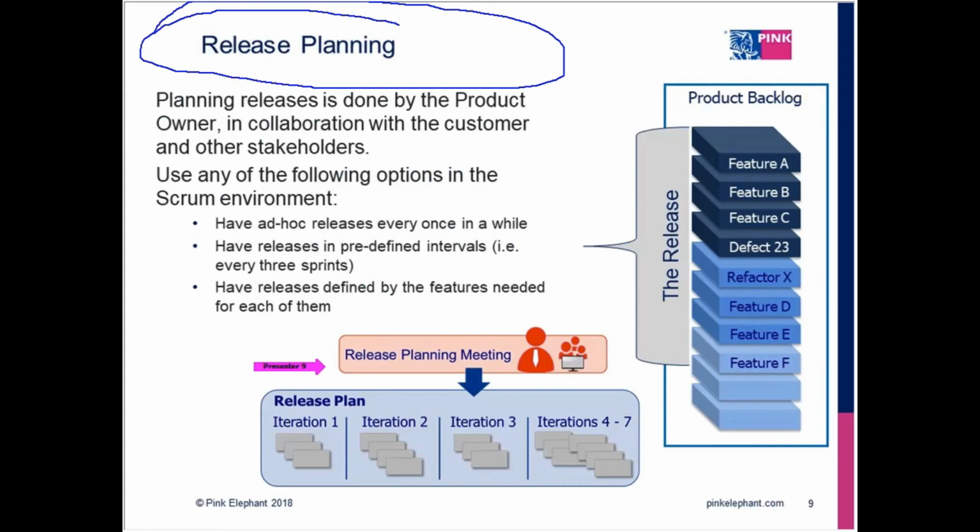The next part of the release planning is saying, during the project and the release itself, each iteration is a sprint. At the end of each sprint, whatever is done is potentially shippable. So are we going to be shipping and deploying parts of a product or service into the production environment at the end of each sprint? Or maybe every 3 sprints, we then have some type of deployment or release.